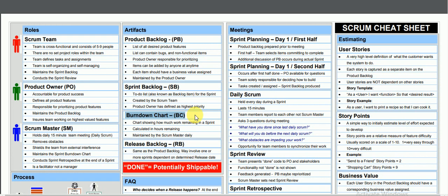He can clearly see in that chart how much work is completed and how much work is pending for the team. Are we in a position to complete those stories in that sprint or not? The Scrum Master will identify that. That is the burn down chart. It is a chart showing how many hours we burned, meaning spent, in that sprint, and how many hours remain, how much work is pending. Are we in a position to complete the remaining work in those hours or not? He identifies that using the burn down chart.